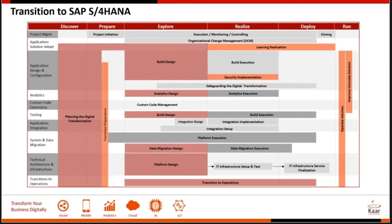From our most recent experience, we strongly recommend running extensive performance tests on the production hardware with full load, including the final hardware setup. In the final production system you will have replication, and once you go live, a lot of data must sync with other reporting systems. Unless you run an end-to-end test of your business transactions with the right scenarios, you will be caught unaware by performance bottlenecks.